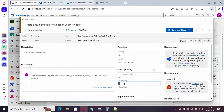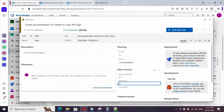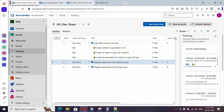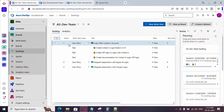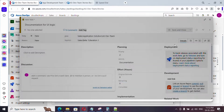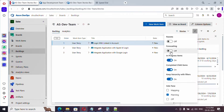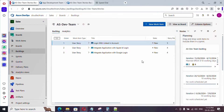Set how many hours the task will take — for example, eight hours — and mark the remaining hours as eight. If I worked for two hours today, I would mark remaining as six and completed as two. Since we haven't started this task yet, we'll leave it at eight. The area path and iteration are looking good. Let's save and close, and I'll create one more task as well. We are now done with the backlog. There's also something called forecasting, which we'll cover in a separate video.